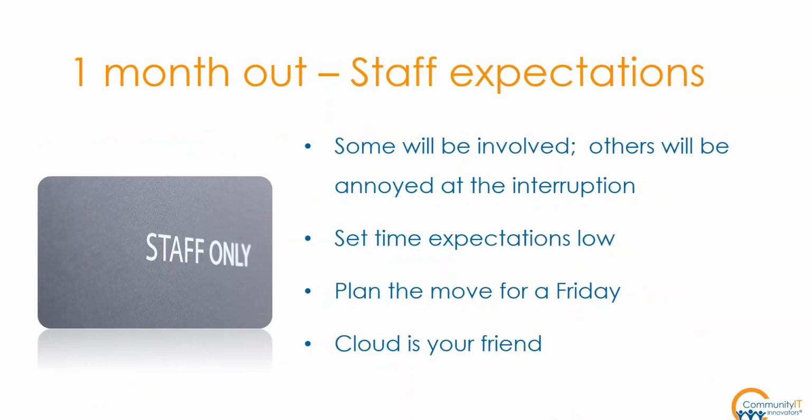All right, so back to staff. Some staff are going to be super excited about the move and excited to plan their new office, and others are just going to be annoyed, and it doesn't matter what you do, this is going to be the case. Yeah, it's important to set low expectations. Usually we like a Friday move, so staff aren't working in the office on Friday, and the network won't be back until the end of the weekend.